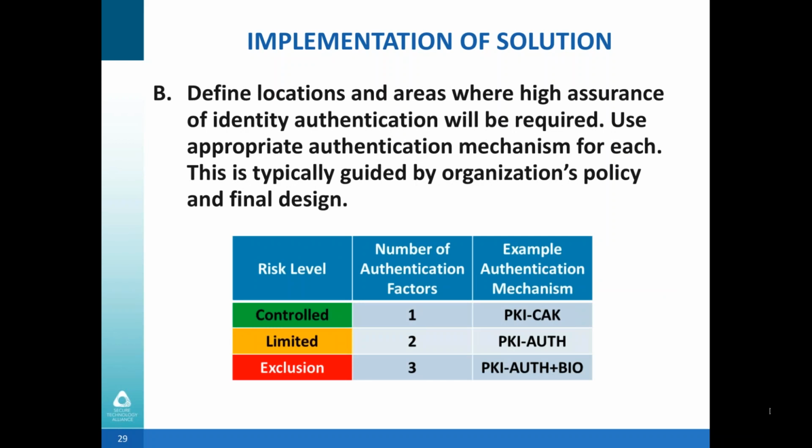During the planning and design phase, it was determined which locations would provide low, medium, and high assurance authentication. During the implementation phase, you would want to verify this, as things do change. Has there been any remodeling or new construction that impacts the plan design? If so, have the reader and assurance levels also changed? If so, plan to incorporate these into the turnover documents and as-built drawings. If major changes, plan to revisit the contract and possibly reset the contract expectations. Next slide.